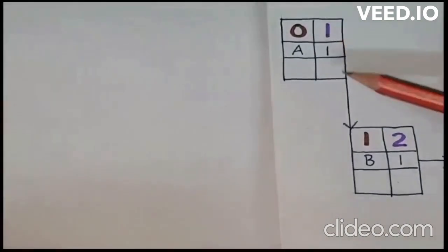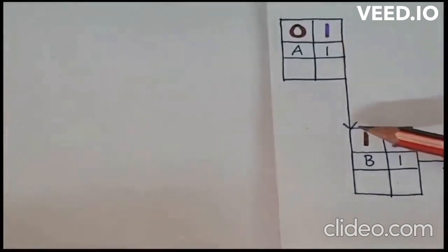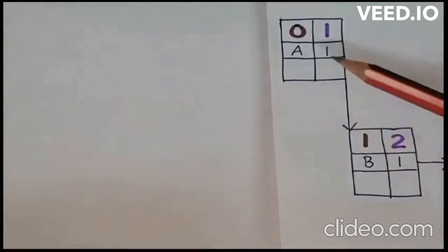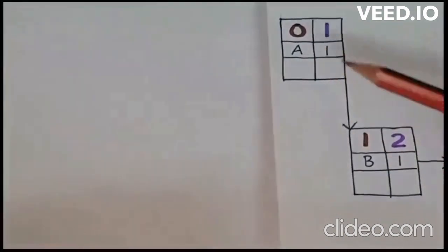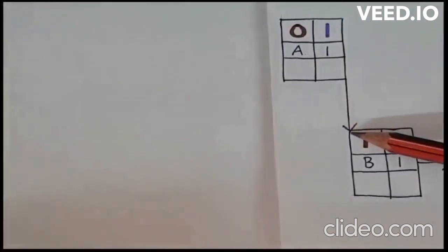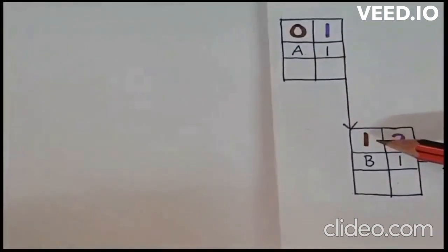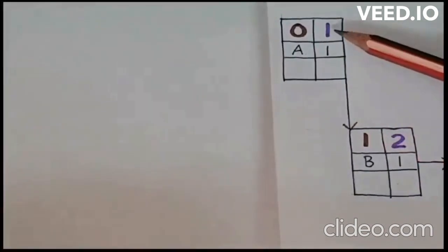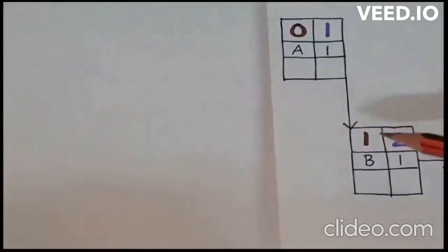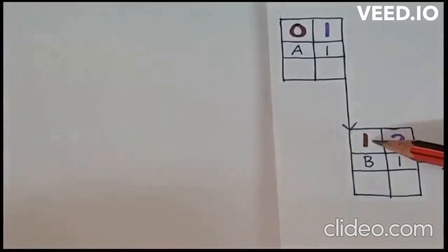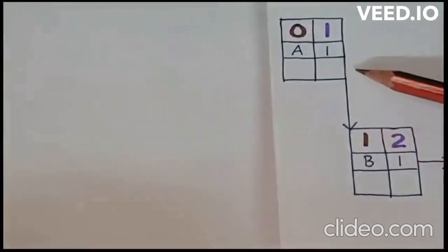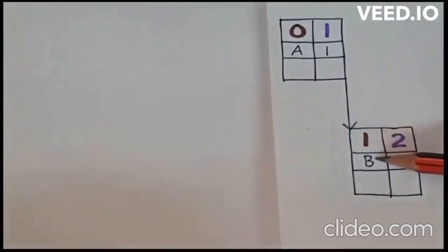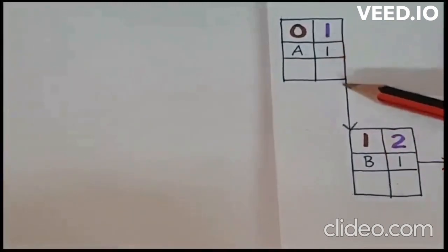Now moving on to the next activity B. For B, A is the preceding activity and the relationship is finish to start. So in a finish to start relationship, the earliest finish time of the preceding activity can be taken as the earliest start time of the succeeding activity B. Here, only A is the preceding activity.